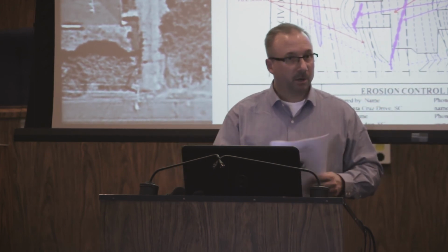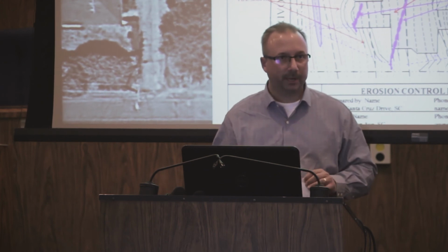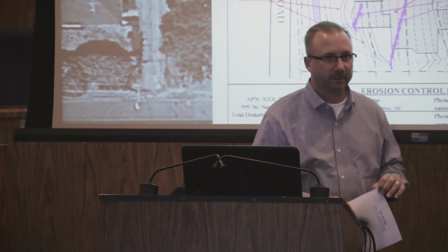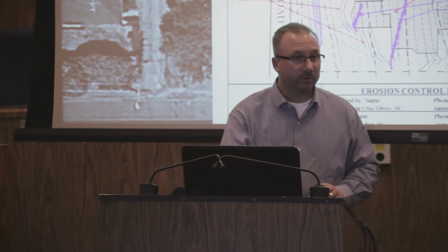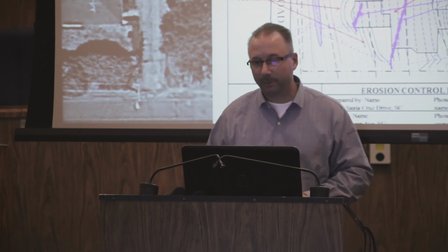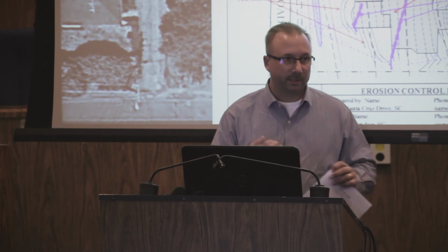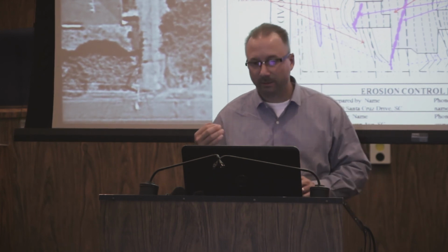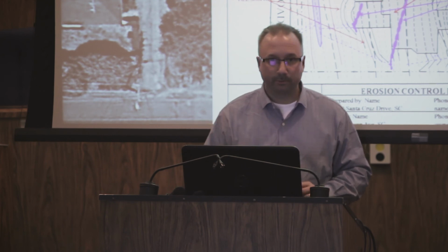Now, smaller project, Rich, same thing. Even the small guys turning in the plans. Right. Yeah. And so the parcel number needs to also be on there as well. And so much of the other notes you see there showing the elevation and showing the flow patterns and the sediment controls, the erosion controls, all of that we've already discussed.